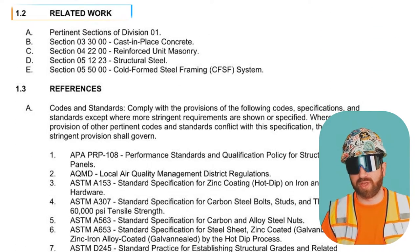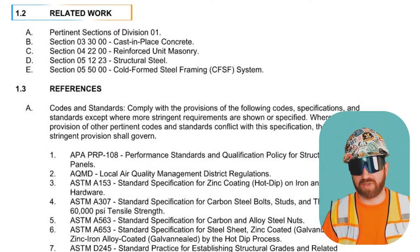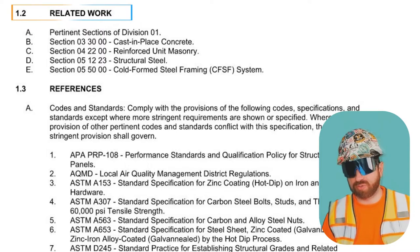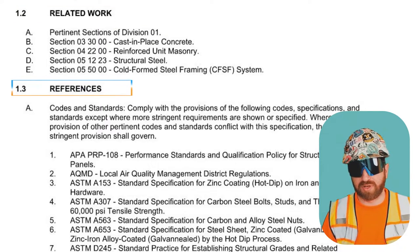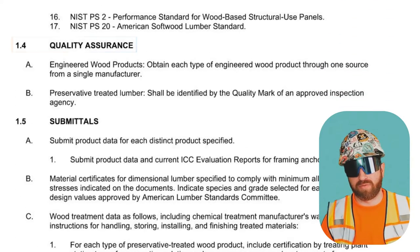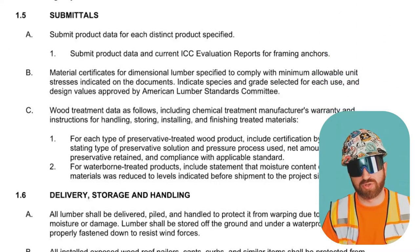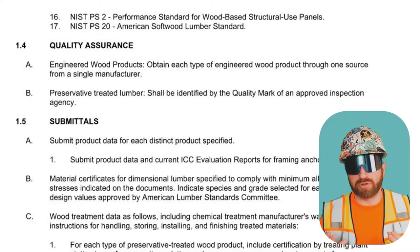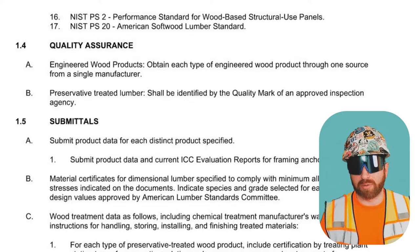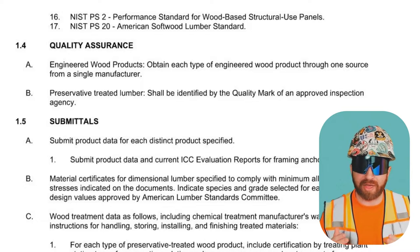Section 1.2 is related work — everything that this specification section might relate to elsewhere in the specification book. Section 1.3 is references — codes and standards. Section 1.4 calls out quality assurance and quality requirements. Section 1.5 is submittals, which can be shop drawings, product data, samples, etc. Material vendors also publish their specifications for their products on their website so that architects can reference them if they want to use the material on that project.